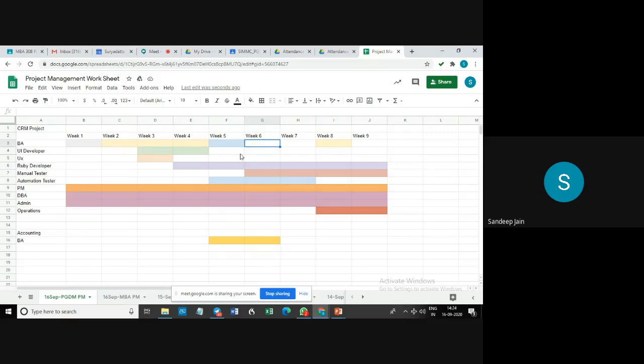But if it happens to be a skill which is probably required with only one person across the entire account, like Vodafone or Idea or Bharti or Tata, then if that person is released from the account, it becomes a problem to get him back because then he would be working on some other account. So to correct that kind of situation, the expectations of the customer have to be set that once this person is released, we will not get him back. So whatever work you need from this person, you better get it done now. And if you need him later, he would be available only on phone or remotely. We cannot get him to a face to face meeting, because that person may not be in Pune. He or she might be in Delhi or Mumbai or wherever.